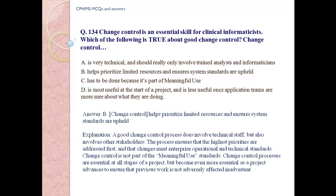Answer B. Change control helps prioritize limited resources and ensure system standards are upheld. The process ensures that the highest priorities are addressed first and that changes meet enterprise operational and technical standards. Change control is not part of meaningful use standards. Change control processes are essential at all stages of a project, but become even more essential as the project advances to ensure that previous work is not adversely affected.